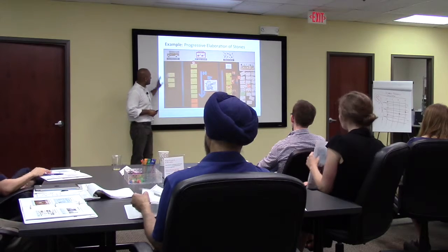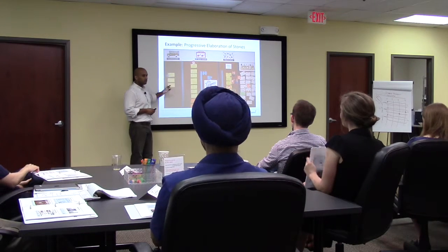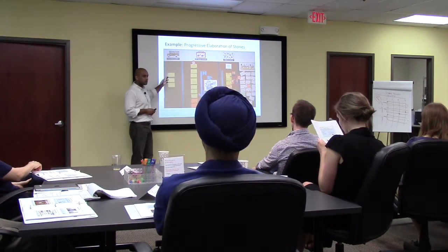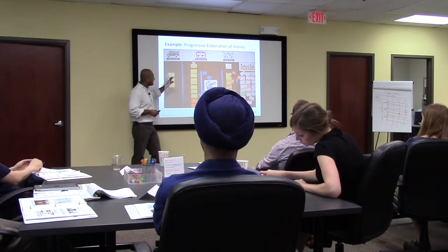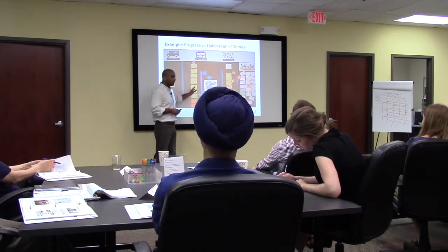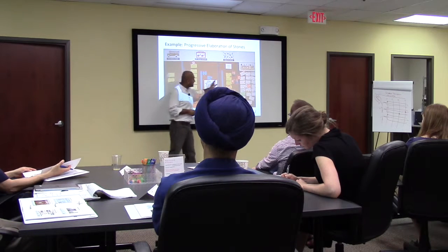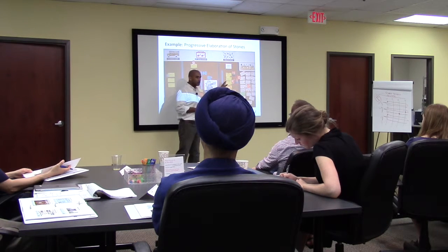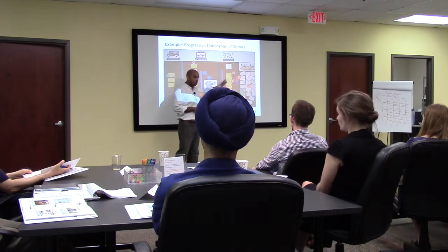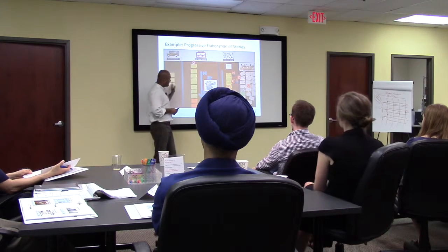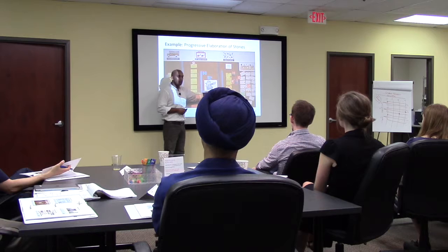At this level, they're probably just looking at high-level information, like market trends, user experience, maybe really high-level epics. At this stage, they might have more visibility into what the epics are, so we can break them down into features. At this stage, they're probably breaking down the features into stories and making stories more independent, more small, and things like that. So they're progressively elaborating their refinement process. And by they, I mean the product owner.